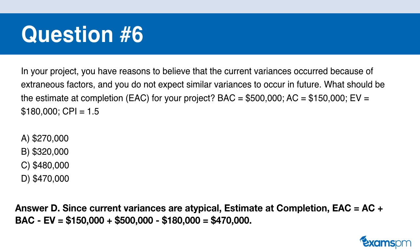If you said D, you are correct. The formula to compute EAC is: AC + BAC − EV = $150,000 + $500,000 − $180,000 = $470,000. There are actually five formulas to compute the EAC, and the way you determine which to use is based on what input values are given. In this case, because we're given BAC, AC, and EV, we plug into this formula.